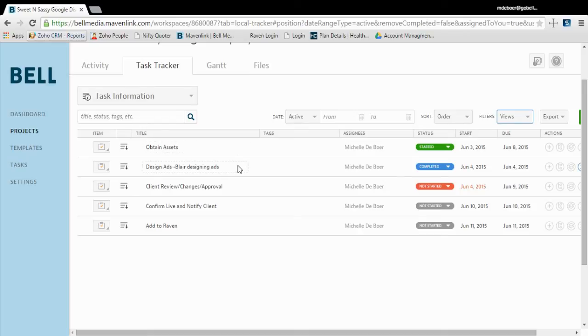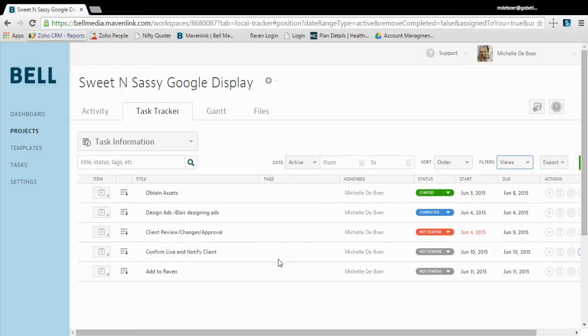When a user logs in and has to complete a task, they can do so by simply using this drop-down status menu and changing it to the appropriate status. It is critical that our team marks statuses complete when they are, because what happens is the next task will not begin until a user completes their current task. This is all managed by the project creation, something that not everybody will interface with, but important for users to know that we have set up this to operate accordingly to timelines as well as a specific Gantt chart.